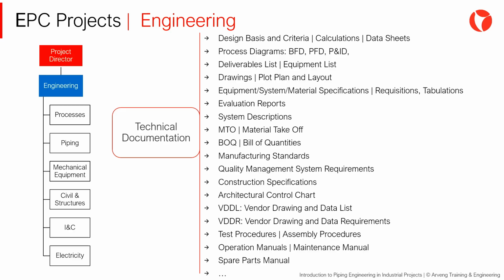This intense engineering activity, the E in EPC contracts, will represent between 5 and 15% of the total cost of the project. Although this proportion seems relatively small, it is crucial to the success of the project. Good engineering reduces acquisition costs, optimizing material selection, construction costs, improving constructability and minimizing changeovers, and subsequent operation and maintenance costs throughout the entire life of the plant.